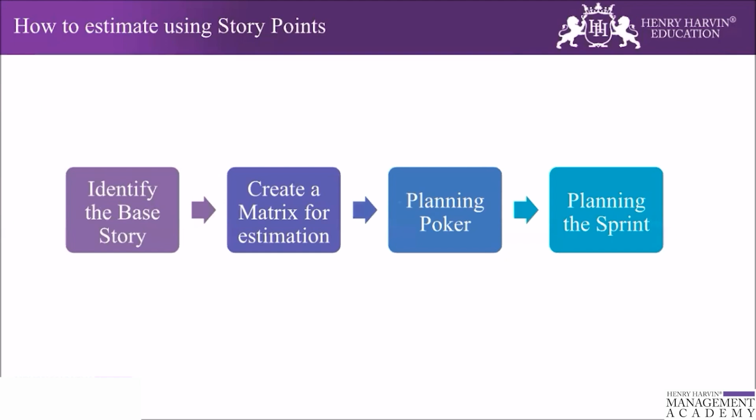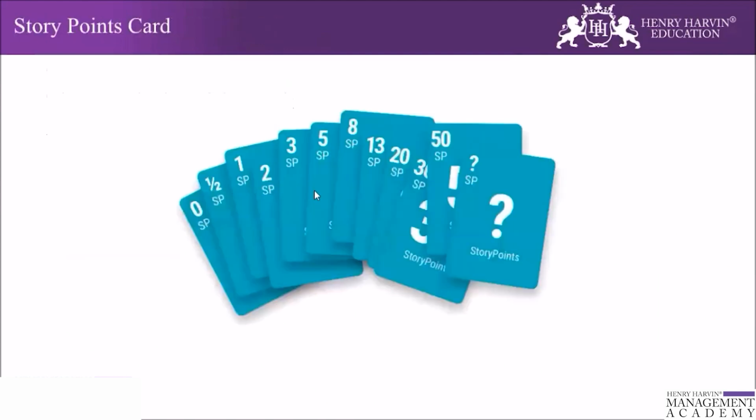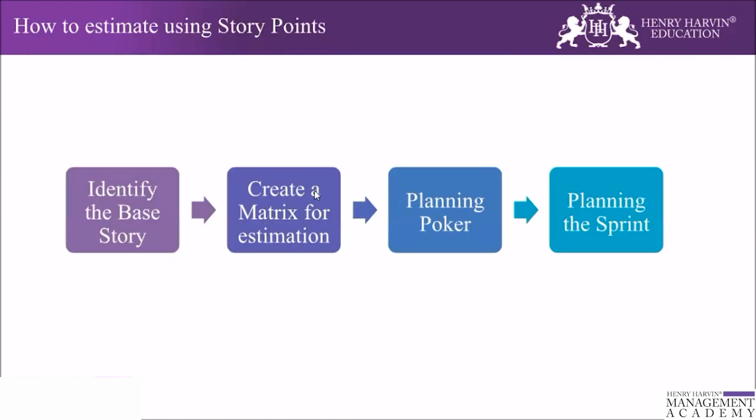how to understand the technical glitch that is required behind the technical estimates that will come. And if you go back and consider all those three things while you estimate, that is a very important part. Don't just estimate the story on the amount of work that needs to be done. Don't estimate the story on the complexity. Don't estimate the story just on the basis of uncertainty. Please include all three things that are required to do the estimation, right?